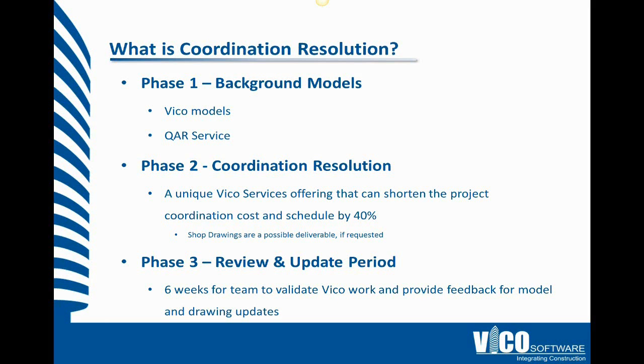We've done some studies on this, and in almost every project we work on, we think we can reduce the schedule for coordination by almost 40%. Lately, as we've dialed in our process a little more, we're starting to see as much as 50% gains. And this is not just in the schedule, so the time it takes to complete the number of meetings, for example, but also the cost, because when your schedule gets longer and longer, there's a lot of cost associated with the people that need to participate in this coordination.